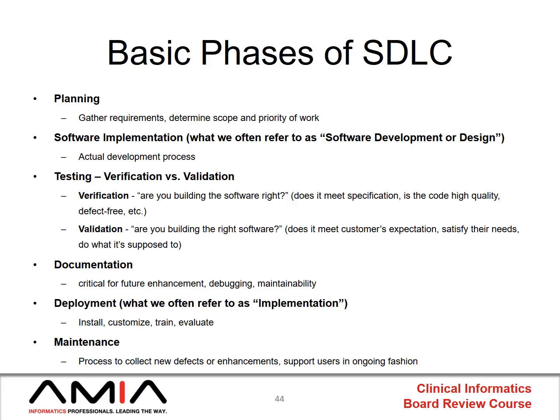Deployment is what we often refer to as implementation. That's the contrast that I had in that second bullet point. And this is the point at which you would install the software, customize it for that specific unit or use case, train the users, and then once it's live, actually evaluate its go-live to make sure that everything went off successfully. Typically, we do things like command centers immediately after large deployments so we can keep track of all the immediate defects that are picked up.